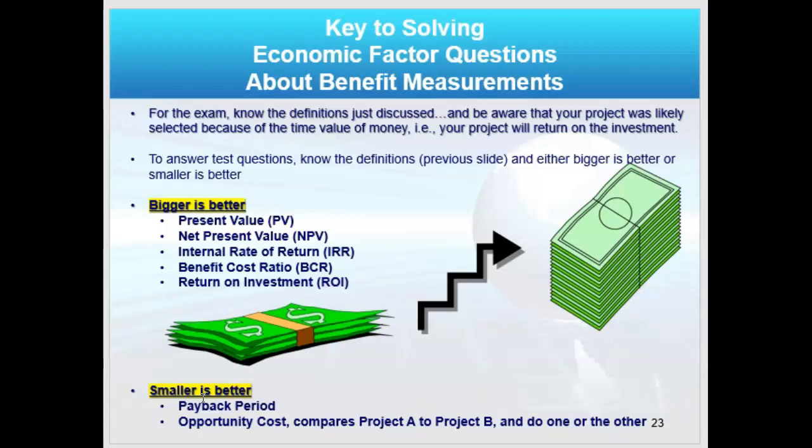I will choose the project that has the higher benefit, which means I'm going to lose the opportunity of the other project. So the project not selected is actually the opportunity cost. It's the cost to the company. You're never going to realize that opportunity. Any of the rest of them, if they give you two present values on the exam or two net present values or two internal rates of return, 8% or 28%, go with bigger is better, 28%, for example.